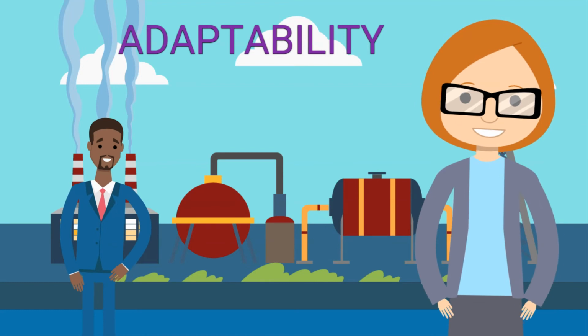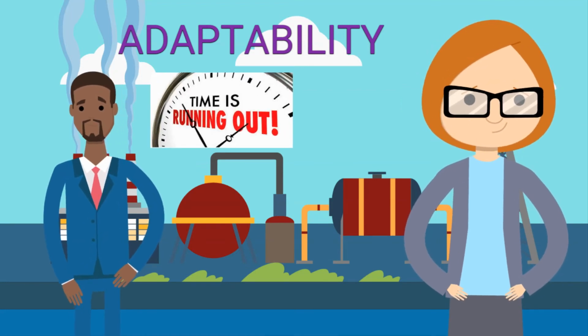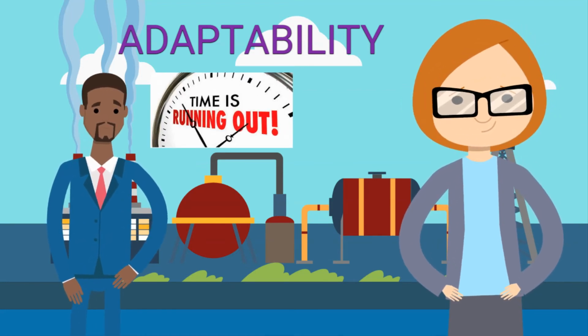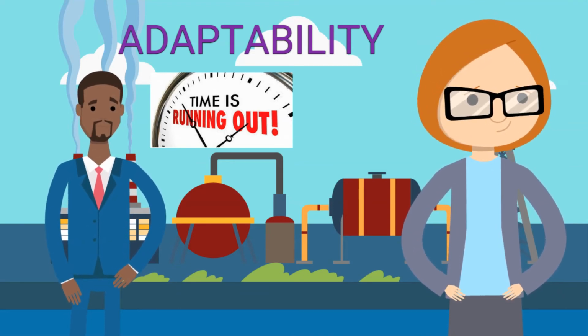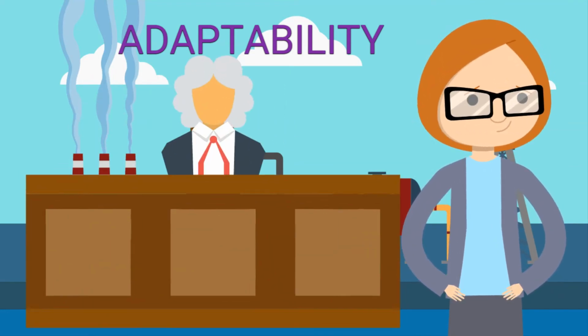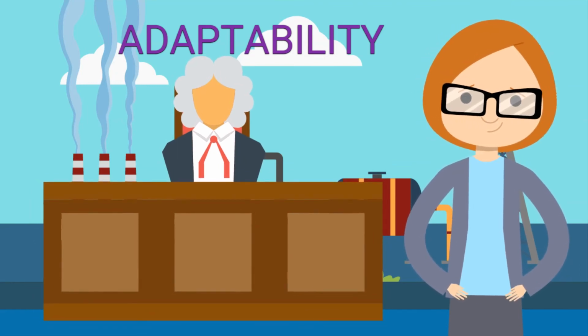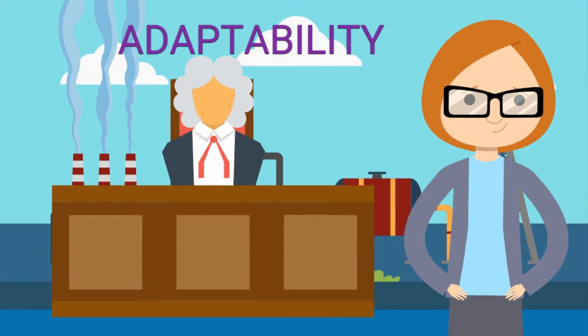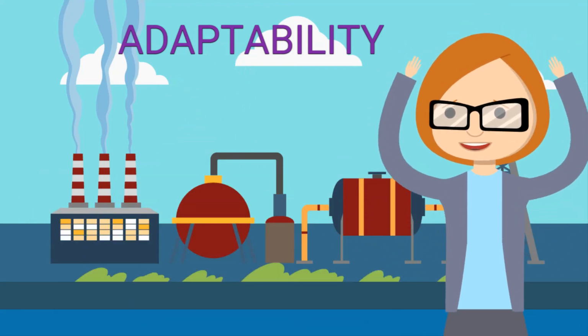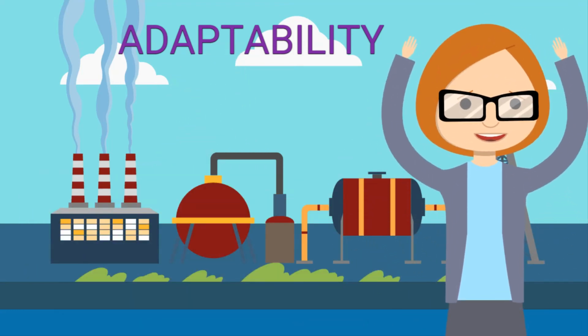You manage the CEO of the current project by creating a deadline to gather the requirements for the B2B web portal and a project scope freeze date. Any proposed changes introduced after the freeze date will require a change request and will need to go in front of a change advisory board for justification and approval. As a leader, you are exhibiting good emotional IQ by adapting to situations that come your way.